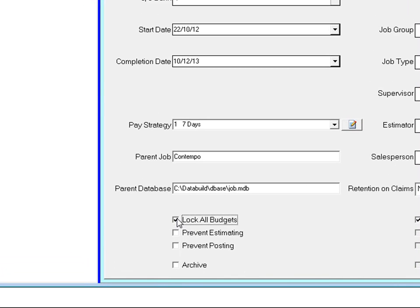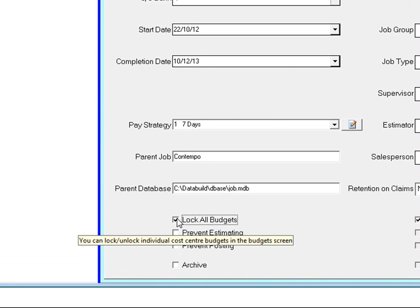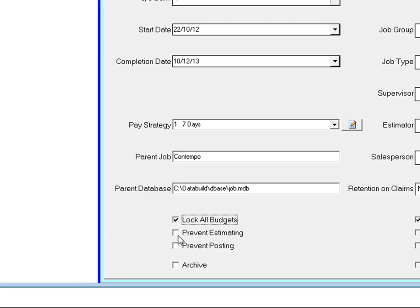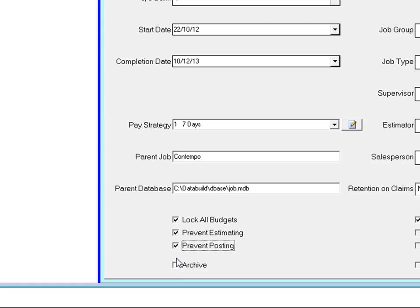You can lock the budgets on the job so job costing reports will always reflect the original budget. Prevent estimating stops any further changes to the estimating component. Prevent posting stops any financial information being processed on this job. You can also archive jobs and hide them from the job list but still retain all the job information.